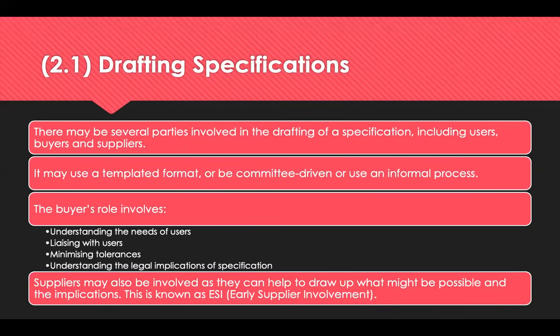Suppliers may also be involved because they help to draw upon what might be possible and also the implications, but this is known as early supplier involvement. And it's more important when you're doing something new or something different for the first time.